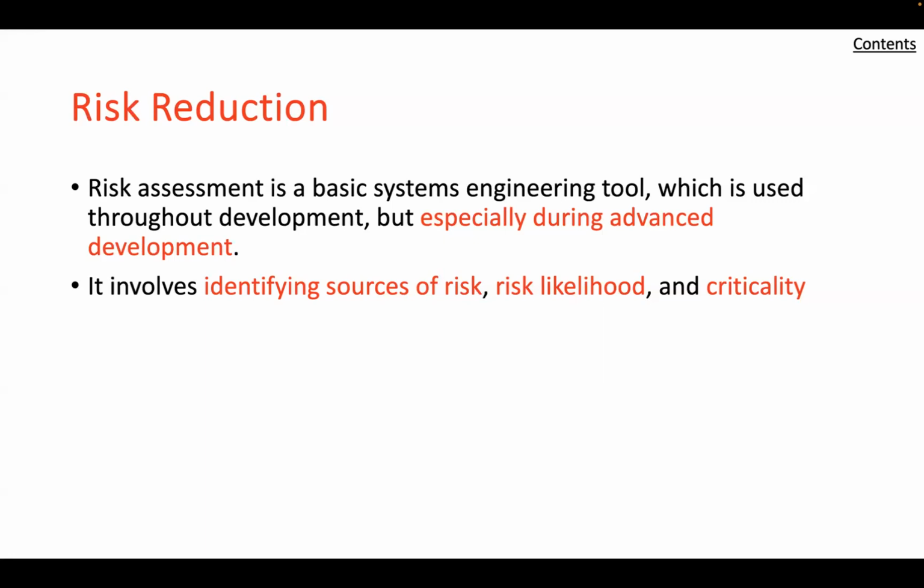By varying the nature and amount of development, a judgment can be made as to the most favorable balance. Thus, for a critical immature component, the balance may call for development up to the prototype stage, while for a non-critical or mature component, it would only call for an analysis.